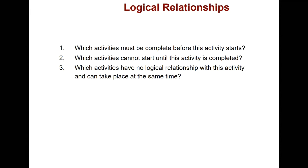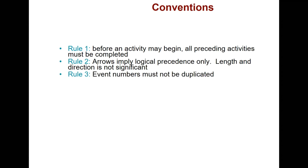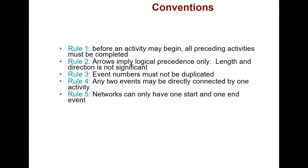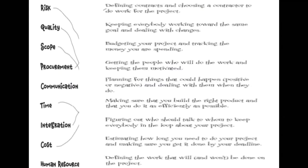When drawing a network diagram, it's important to understand logical relationships: which activities must be complete before this activity starts, and which cannot start until this activity is completed. As a main contractor, you bring all subcontractors into one room to visually understand how they would like to sequence their work — there may be negotiation and dialogue before drawing the logic. Project management is a broad subject area encompassing risk, quality, scope, procurement, communication, time management, integration, cost management, and human resources, but this module focuses on planning and scheduling techniques.